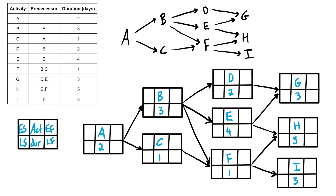With that set up, we're ready to start the forward pass. We start with the initial activity A at an early start of zero, add the duration of two, giving an early finish of two. That early finish feeds into the early starts of B and C, both receiving a two. Two plus three gives B an early finish of five; two plus one gives C an early finish of three. Activity D gets an early start of five from B. Activity E also gets five. For F, we have two competing values — five from B or three from C — and we take the larger, so five. Adding durations: five plus two is seven for D, five plus four is nine for E, and five plus one is six for F.